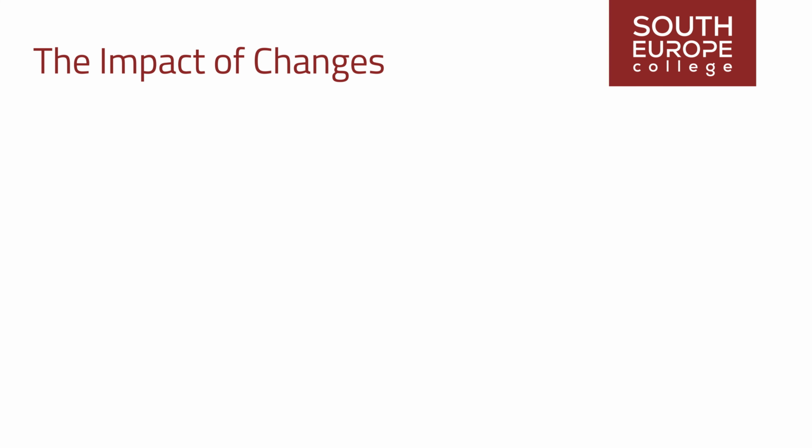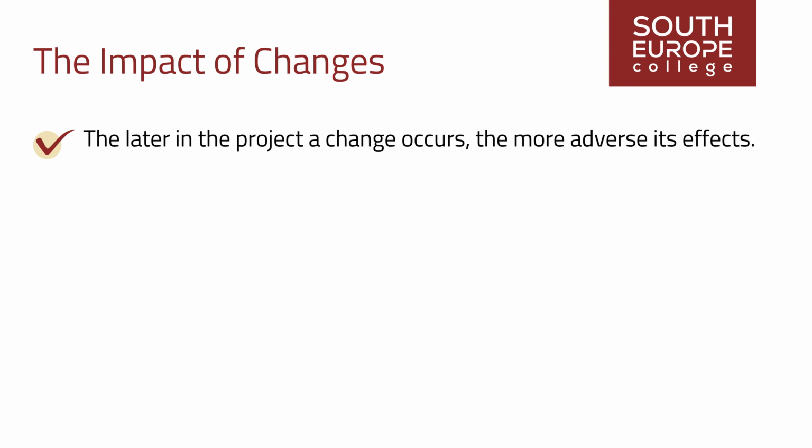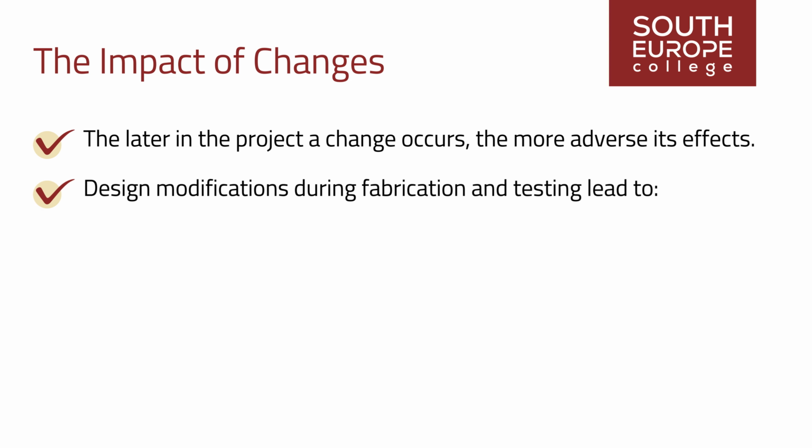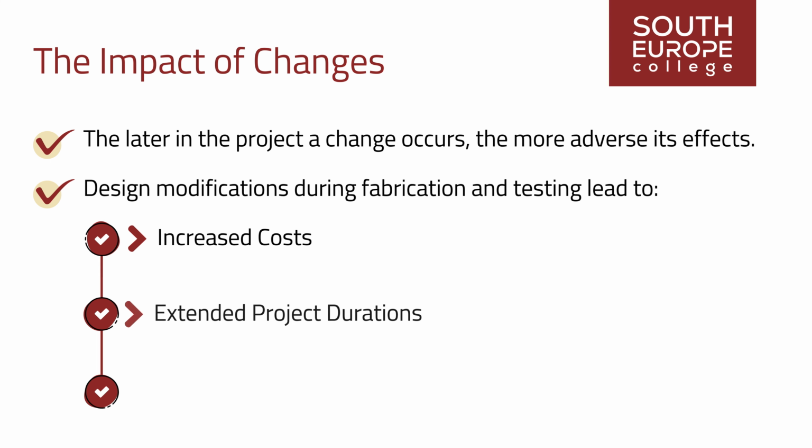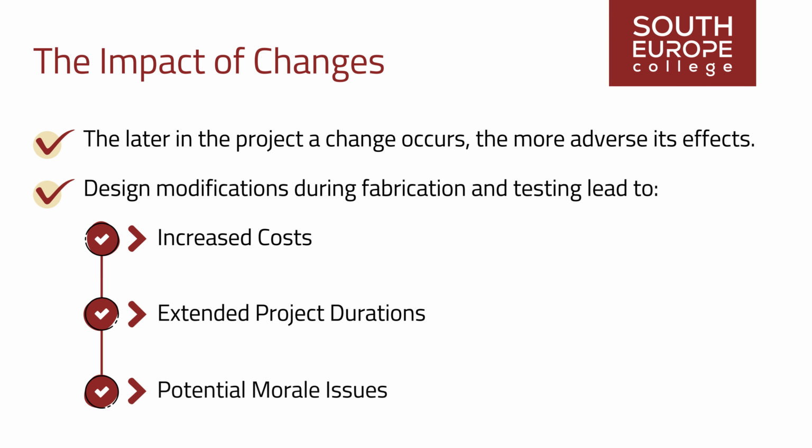As a general principle, the later in the project a change occurs, the more adverse its effects. The further along the project timeline, the more work must be undone and redone in response to a change. Design modifications during fabrication and testing, and even more so during construction and installation, lead to increased costs, extended project duration, and potential morale issues.